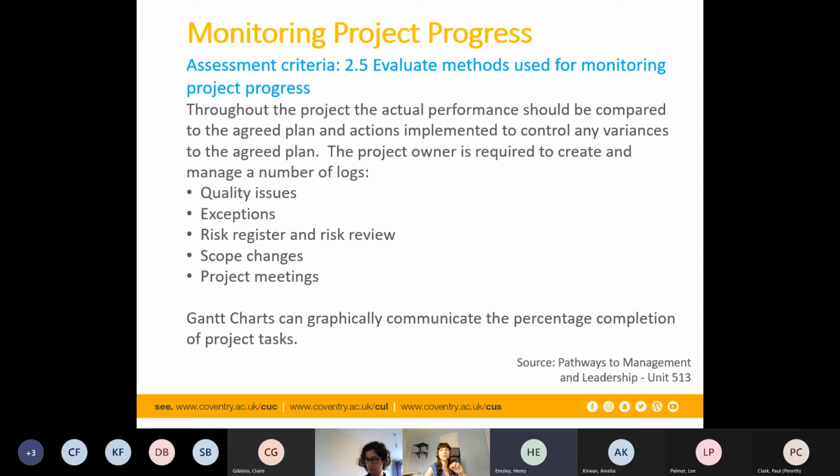And do the prices fluctuate, or do they stay the same? They fluctuate depending on a number of different things. So if you get night concrete deliveries, it's triple the cost in some cases. Yeah. Wow. Okay. Yeah, if the plant has to open specifically for you on a night shift, you get a big cost on that. So depending on how you program your works, days or nights, massively impacts your cost. And when you're securing the contracts to deliver them, have you set out whether it's going to be days or nights? Yeah, that's part of the pre-award stage where we discuss the working hours, the shift type, whether it's nights or days.